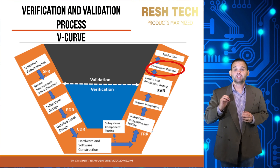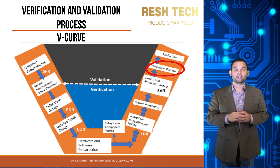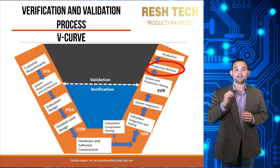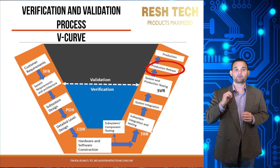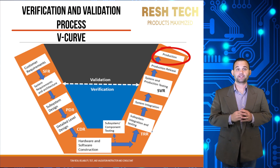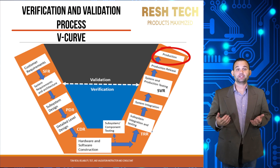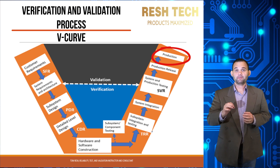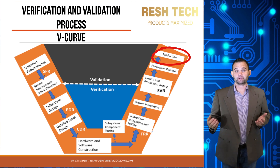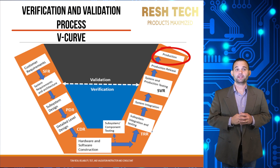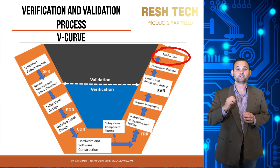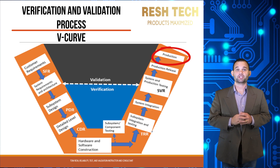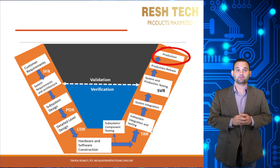Next is the production release — a final review checklist to ensure all i's are dotted and t's are crossed, and that all reports, data, and requirements have been met for production. Once the system or product exits the production release gate, it is ready for mass production and shipment to customers. Maintaining the highest level of quality and reliability is an ongoing process — checks and tests must remain in place to ensure the product continues to meet customer requirements for the life of the program after mass production release.